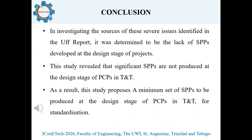In concluding the study and investigating the sources of the severe issues identified in the Off Report, it was found that the lack of subsidiary project plans developed at the design stage is the main contributing issue. The primary statistical analysis also revealed that significant subsidiary project plans are not produced at the design stage of public construction projects in Trinidad and Tobago. As a result, in attempts to curb this issue, this study proposes a minimum set of subsidiary project plans to be produced at the design stage for standardization.